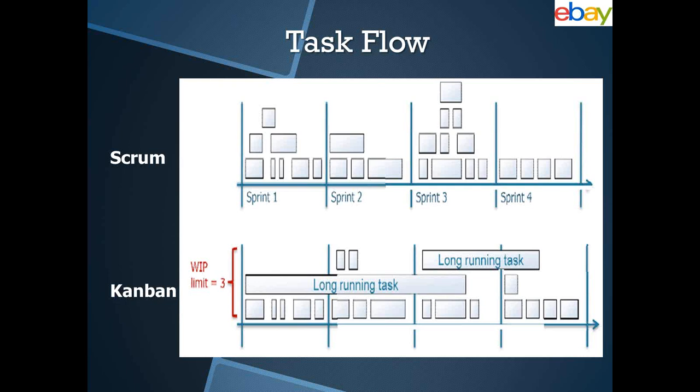So we have set our work in progress limit to 3. So at any time, we'll do only 3 tasks. This board is persistent. There's no resetting anywhere. We'll do only 3 tasks. And it doesn't matter what the size of the task is.